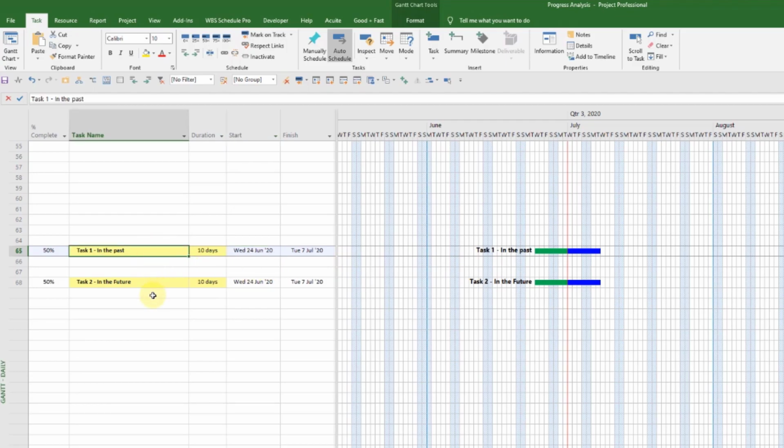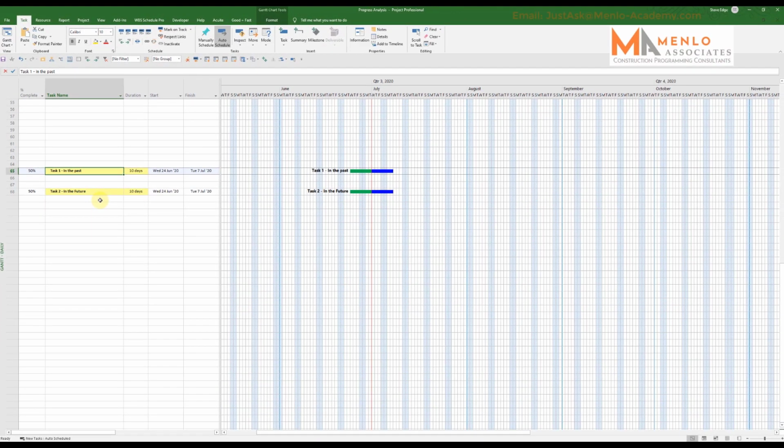Now, the reason for doing this is there could be an argument further down the line where, even if this job is not on critical path, it might have, say, 20 days of slack. If you start 10 days late and it's a 10-day job, then you've still got 10 days of slack. It's not affecting your critical path. It's not affecting your finish date. All it's doing is chewing up available slack. But the chain of work that follows on from this is also losing the slack.